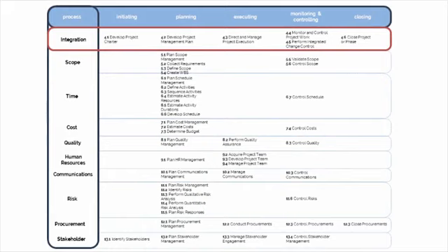Please note that an important input in this process is accepted deliverables, which is an output from the verify scope process. This means that the deliverables have been reviewed to ensure that all were completed correctly and satisfactorily, and we have obtained sign-off from the customer.